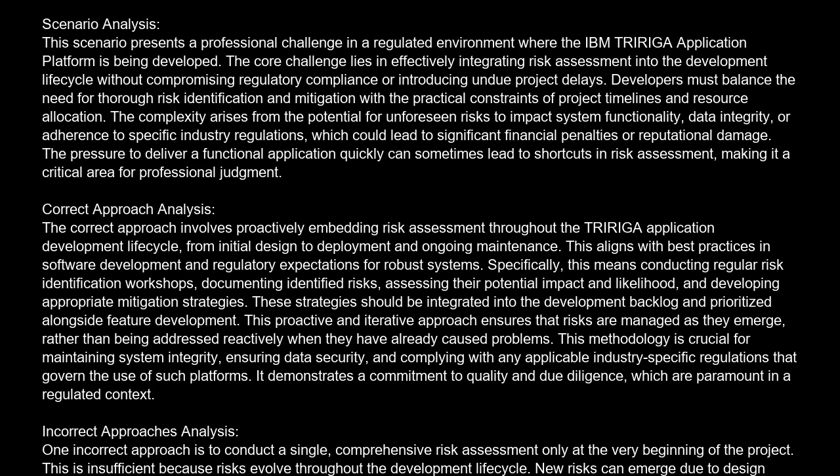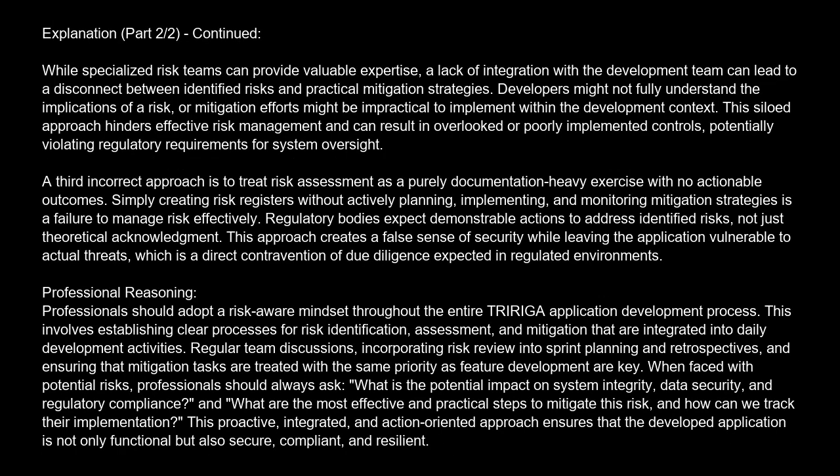Another incorrect approach is to delegate risk assessment solely to a separate, non-development team without close collaboration. While specialized risk teams can provide valuable expertise, a lack of integration with the development team can lead to a disconnect between identified risks and practical mitigation strategies. Developers might not fully understand the implications of a risk, or mitigation efforts might be impractical to implement within the development context. This siloed approach hinders effective risk management and can result in overlooked or poorly implemented controls, potentially violating regulatory requirements for system oversight.